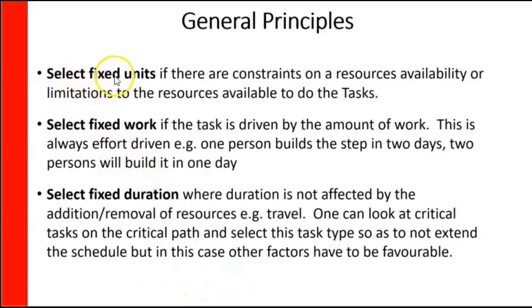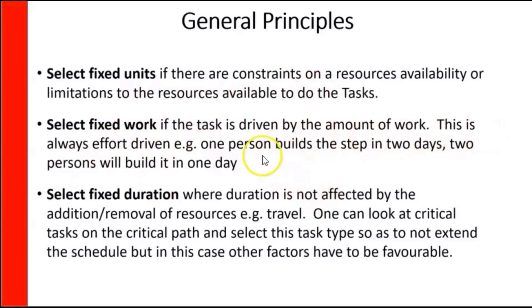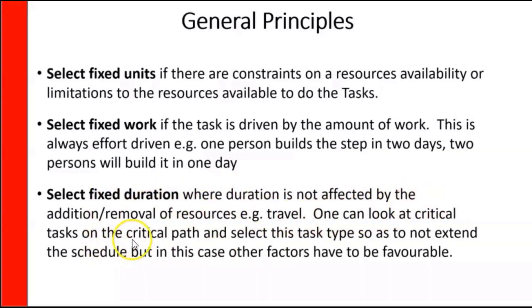Therefore: select Fixed Units if there are constraints on resource availability or limitations to the resources available to do the tasks. Select Fixed Work if the task is driven by the amount of work — this is always effort-driven — for example, one person builds a step in two days, two persons will build it in one day. Select Fixed Duration where duration is not affected by the addition or removal of resources, for example travel. One can look at critical tasks on the critical path and select this task type so as not to extend the schedule, but other factors have to be favorable.